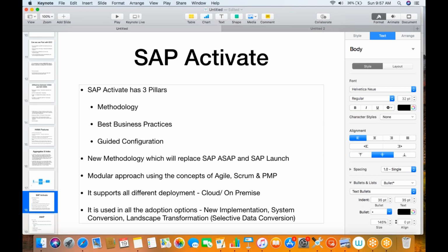Okay, so SAP also provides trial versions which can be bought by the customer. And in that trial version you can activate the best practices based on different countries. So for example, if you are implementing SAP S/4HANA in the US, you will implement the best practices for the US, which will already have the configuration data, which is already having the master data. You just need to go in front of the customer and execute a particular end-to-end scenario.